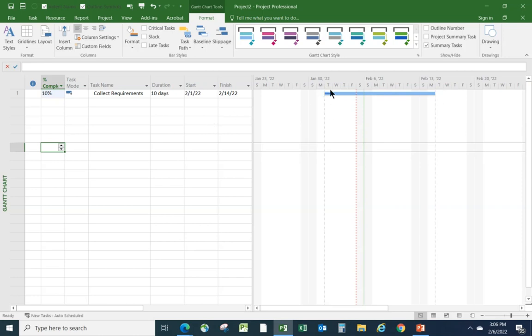And if it took them a full day, or to the end of this week, to get only 10% of the work done, when they should have been a lot further along, more than likely they're going to take longer to do all the rest of the work. Not necessarily, but it is a possibility. So in many cases, simply saying 10% complete or 50% complete can give you less information than you really want from someone.